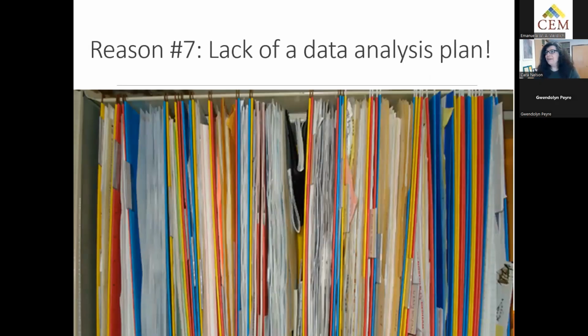Reason number 7 is lack of a data analysis plan. This is critically important to do when you're developing your monitoring plan at the project planning stage for many reasons. One of them is that if you don't have a data analysis plan, when it comes time to analyze your data, you may realize you didn't collect variables that were important or you didn't have enough replication.